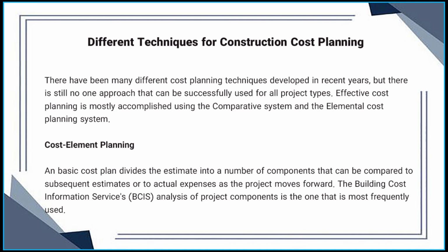Cost element planning. A basic cost plan divides the estimate into a number of components that can be compared to subsequent estimates or to actual expenses as the project moves forward. The Building Cost Information Services (BCIS) analysis of project components is the one that is most frequently used.